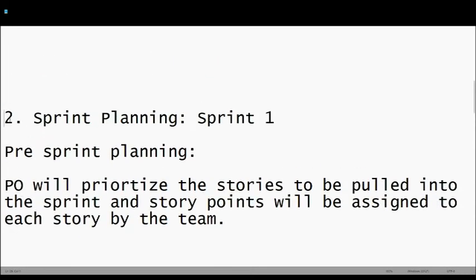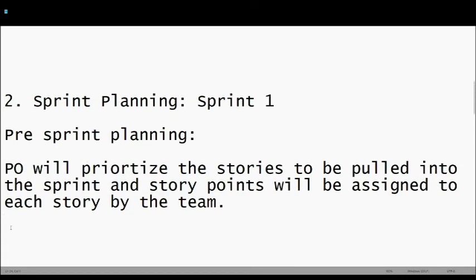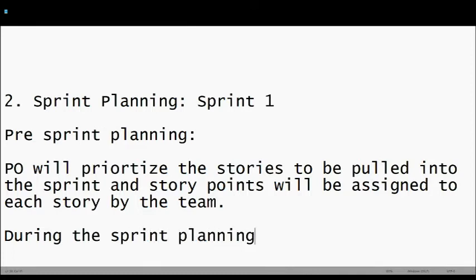During the sprint planning, there is one more thing that is a responsibility of a scrum master. You will make sure that the stories that are being pulled into the sprint have a proper definition of done. There has to be complete clarity in the mind of the developer that is going to work on the story of what he needs to do and what needs to be done to make the story complete.